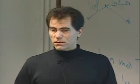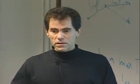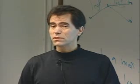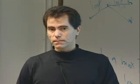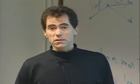From an engineer's point of view, one of the things that should pique your interest is that when you have separate contracts, you always have a question of integration. Okay, if you're going to compete separately, you're going to have two separate pieces. Who's going to integrate them? The integration job will be harder when you compete them separately.